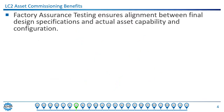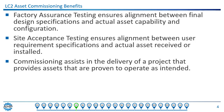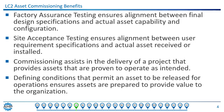Here are the benefits associated with the processes that belong to asset commissioning. Factory assurance testing ensures alignment between the final design specification and the actual asset capability and configuration before it's installed on site. Site acceptance testing ensures alignment between the user requirement specifications, the design, and actual assets that are received and installed on the site. Commissioning assists in the delivery of a project that provides assets proven to operate as intended. And defining conditions that permit an asset to be released for operations ensures that assets are prepared to provide value to the organization.